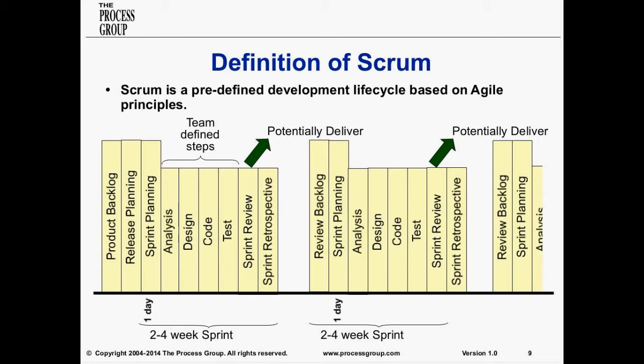They then partition the work into sections, and they determine what would be for them a logical release, and they do release planning. So they may have an idea of all the features and functions they want to deliver, and they go through some estimation to determine roughly how big or how much work there would be there, and then they determine a logical release for that set of functions, and they build a release plan.